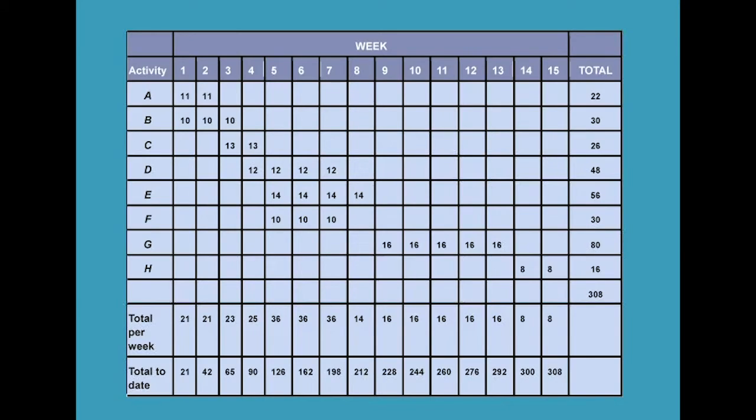As the third point states, using the ES and LS, we can calculate how much money should be spent during each week or month to finish the project by the date desired, and hence it can be computed more specifically. Hence, we can get the exact cost distributed per week using ESTs in the following activity table. Similarly, using LSTs, we get the exact cost distributed each week, which is represented in the following table again. This is how the scheduling of the project is done.